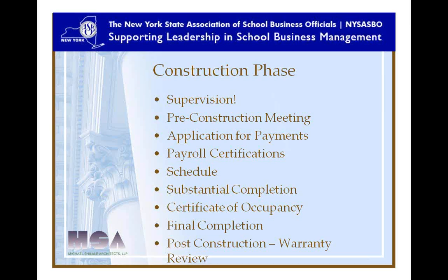Before the one-year time period is up after substantial completion, it's a good idea to walk through your buildings to make sure that the building systems are all working. If there is anything that is not functioning or is not working the way it was, we should document that so that it falls under your warranty and can be identified with the appropriate contractor or manufacturer to make sure they rectify the problem.